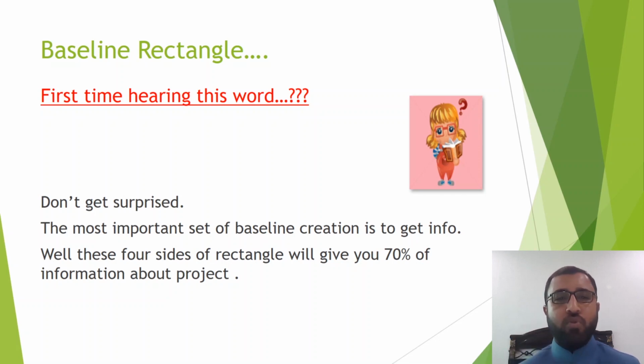From the contract you will get information regarding the milestones and the penalties. From the BOQ you will get all the activities, their quantities, and their cost, and from the drawings definitely you will understand what is the scope of the project.